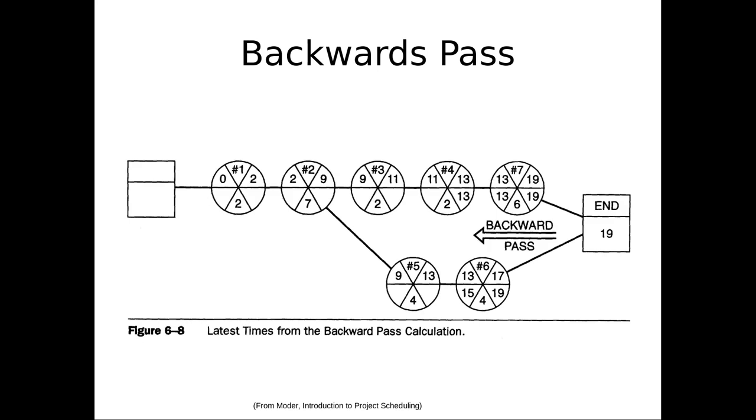Let's suppose we have this and I say, oh, do you remember this? What was the latest we could start it without delaying the project? 11. If I said, oh, come on, I'll wait till day 11 to start this, do you think someone who's responsible for this task could be unhappy? Yeah, because I've eaten their float. They have no leeway. I've taken their flexibility away from them. I've consumed their flexibility, and they could be blamed if they're late now, because how are they supposed to get their job done? They have to be right on top of it.